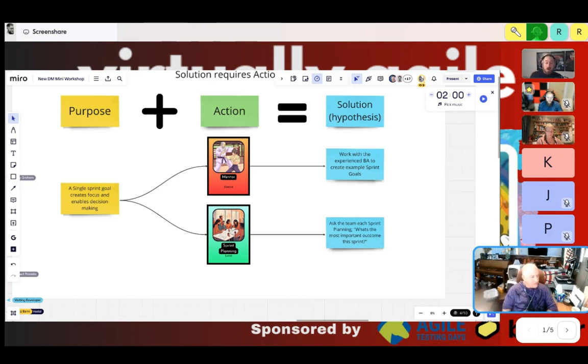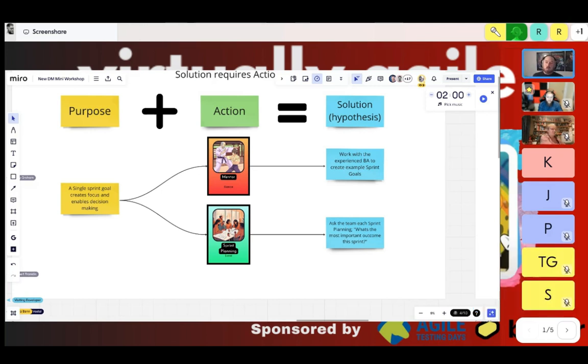Yeah, so I guess the simplest way of putting it is once we've defined a purpose, which is to say the underlying principle of value behind a dysfunction, right? So say the team's not setting sprint goals. I'm going to think about, well, why do sprint goals exist? What's the value? How do I articulate that to people? And now that I've thought that through, I can come up with an action that helps that purpose to be understood or to be fulfilled. And I'm going to think through a number of ways, right? And so those cards that I shared, there's a whole deck of those, 55 of them, with examples of stances of the Scrum Master and mechanisms and tools. And you're basically just saying, what's a small thing that I can do that's like a 15% solution that might step us in the direction of fulfilling that purpose.